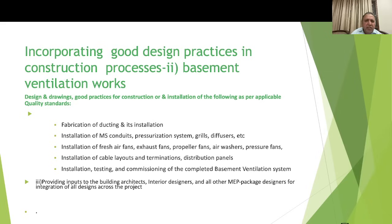For basement ventilation, the main installation requirements are: fabrication and installation of ducting, installation of MS conduit systems, grills, diffusers, fresh air fans, exhaust fans, propeller fans, air washers, pressure fans, cable layout and terminations, distribution panels, and testing and commissioning of the complete basement ventilation system. This also involves providing inputs to building architects, interior designers, and other MEP package designers for integration through BIM.